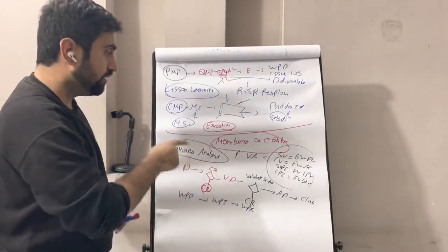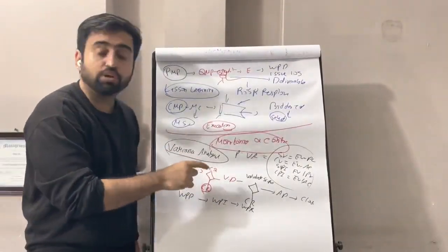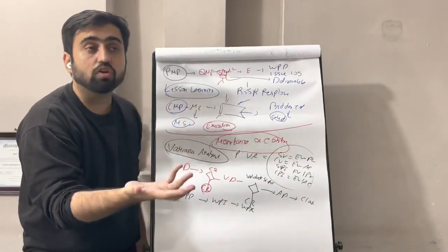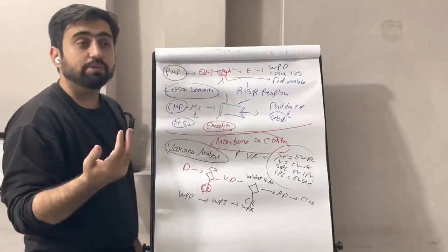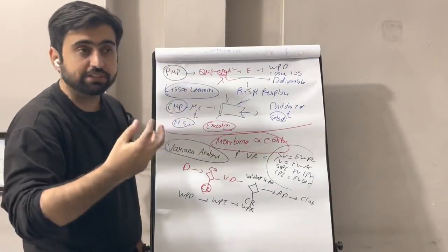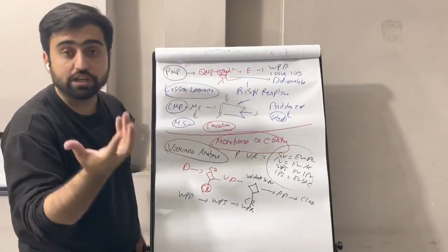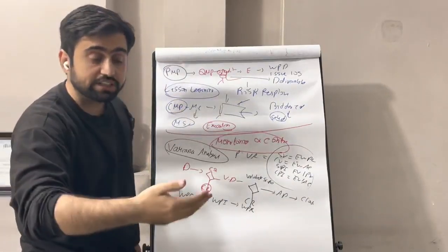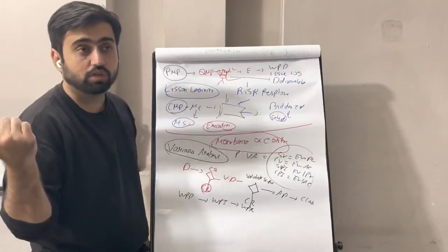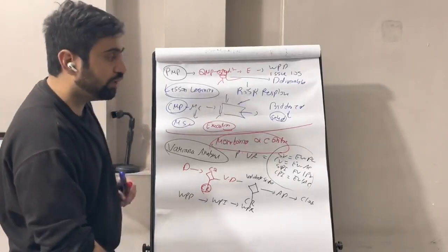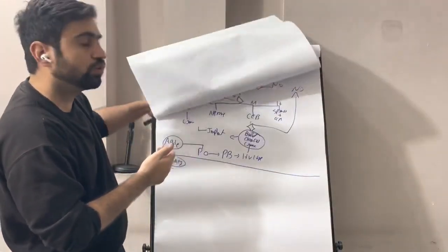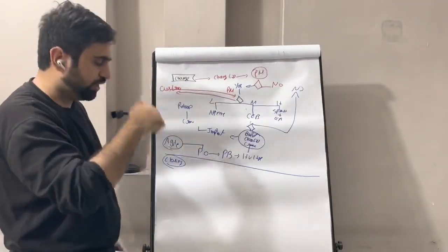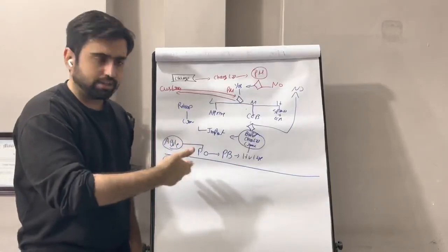In the procurement domain for monitoring and control, you inspect the deliverables. If the deliverables are not according to your agreement, then you try to negotiate with them, try to get an agreement. If you cannot get an agreement, you try a mediator. You try to do what is written in the contract. If not, then you go to the court. You try to close all the procurement before going to closing the project. But if the procurements are not closed, we can still come to the closing of the project.